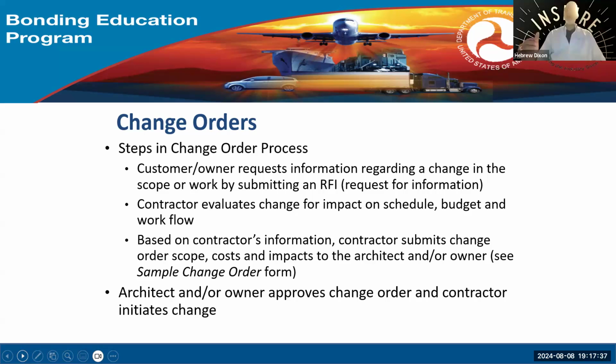That's another change that I've seen sometimes that people don't submit. Or it's no cost, but it cost me 2 days. At the end of the project, those 2 days will add up to maybe a week, right? So you want to make sure you do that. You can go to the next slide.